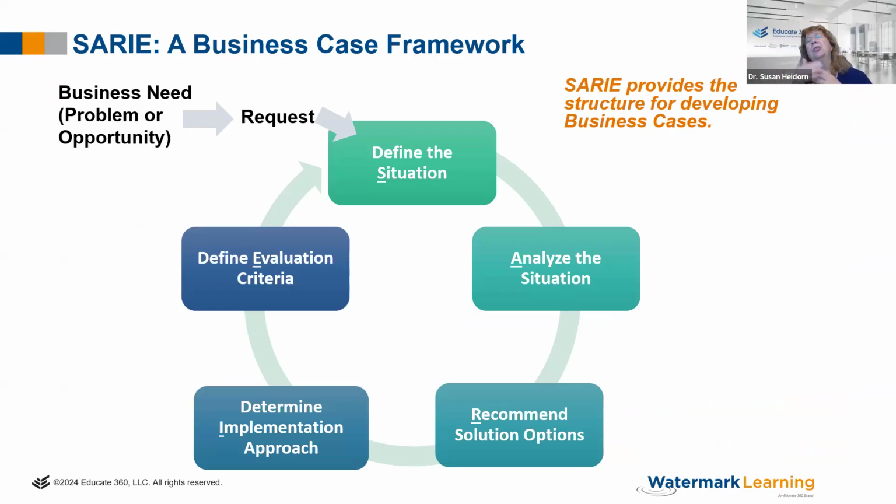Now, you don't create a business case on everything because they do take time. So oftentimes companies have a threshold, and some of them will say, okay, $100,000 or greater, if we think that's the cost, you have to do a business case. If it's less than that, we're not going to worry about it. Sometimes it's 50. It really depends on how large the company is and where their thresholds are. So it's like, okay, what's your threshold? On these projects, I don't need a business case, maybe I just need a request. On these, I need a full-blown business case that goes through the process and gets blessed by the portfolio team or whoever approves them. So you have the request.